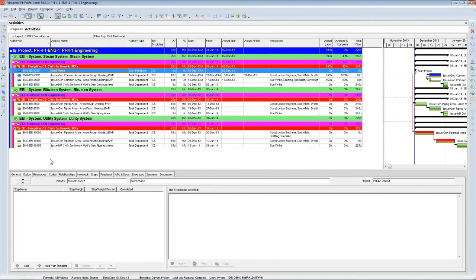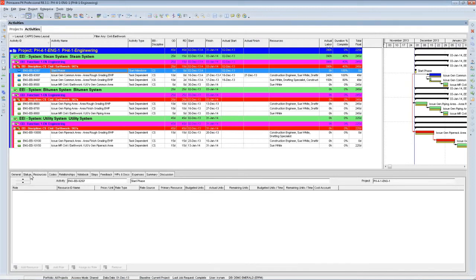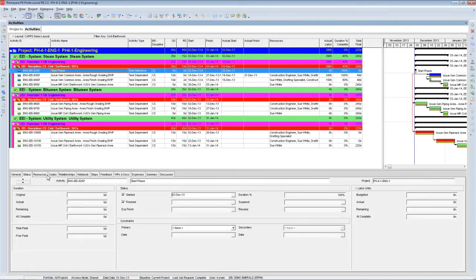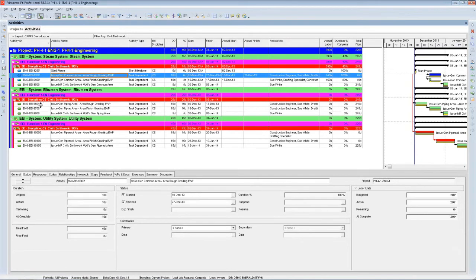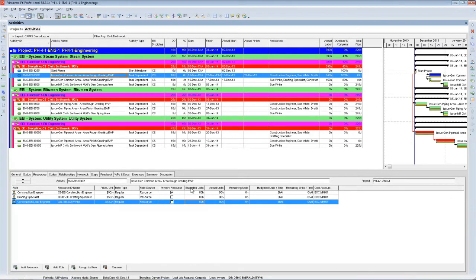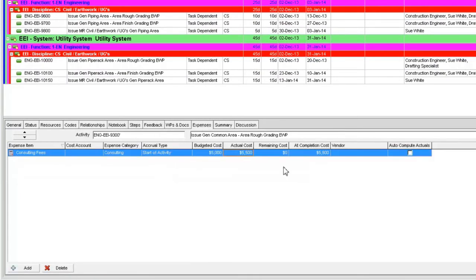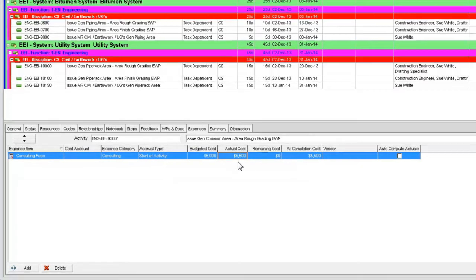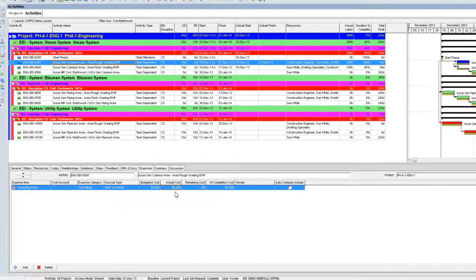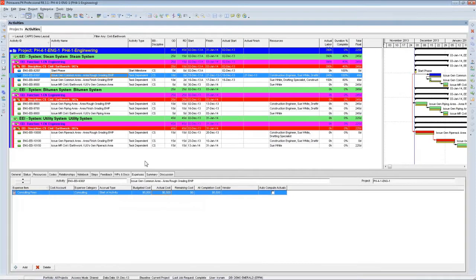And I can view each task individually, so the first one is a milestone. So it was started as planned, and two other tasks that I have updated, 9300. So we have the actual dates in P6, and the actual resource usage, and there was also an expense that we entered. So we have the actual cost, which is a little more than we planned for this activity.